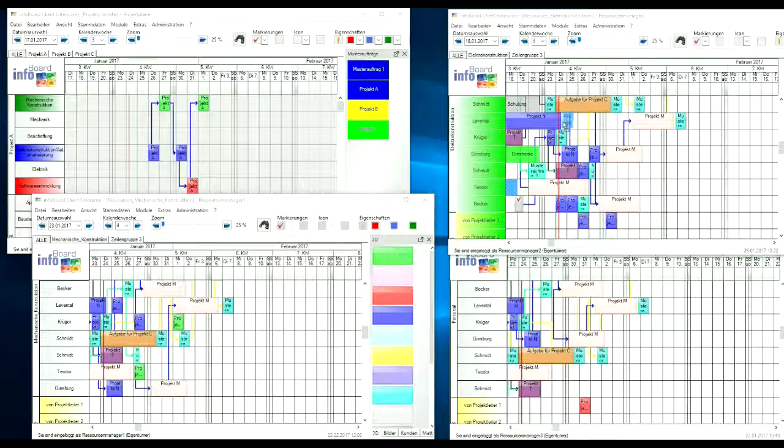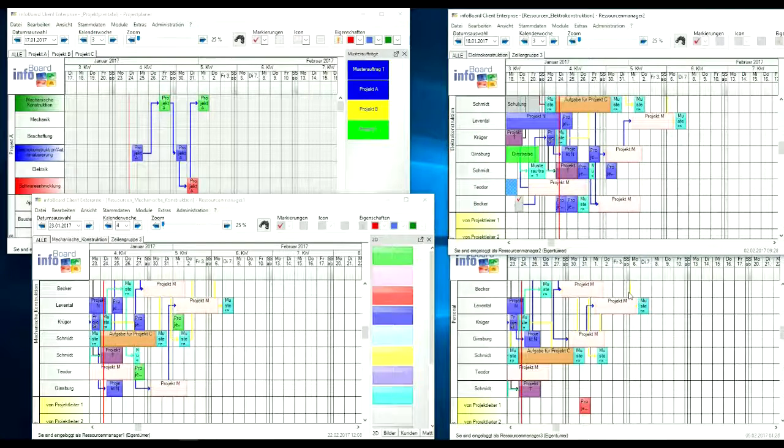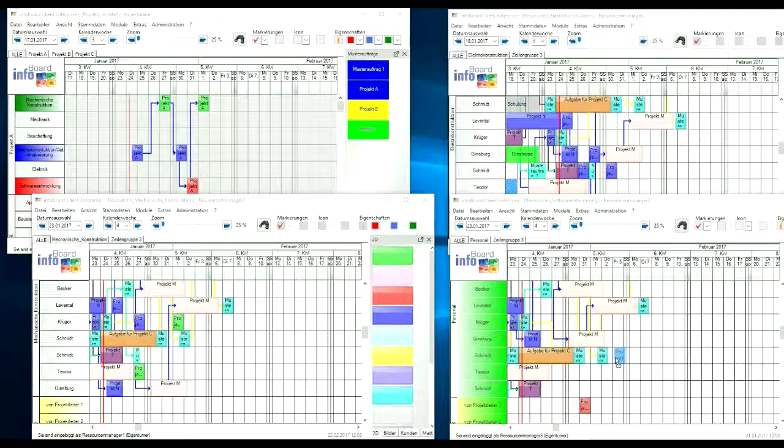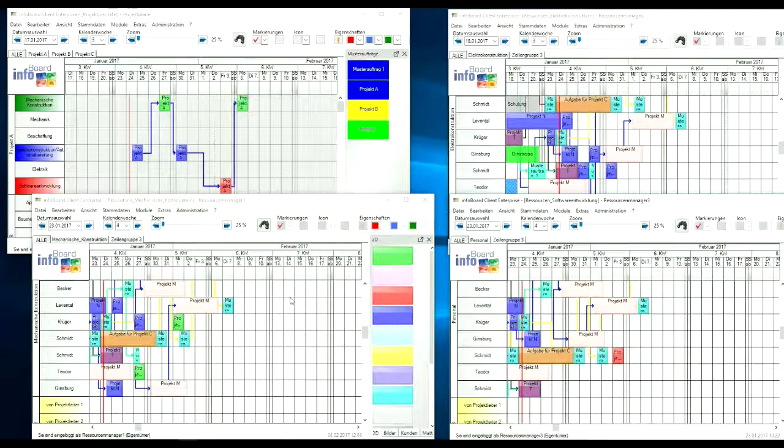If the period of the individual object is changed in the resource planning board, the project schedule synchronizes automatically. After the synchronization of the resources, the objects of the first section change similarly. The department manager obtains the correlated information and has to find a free resource for this change.